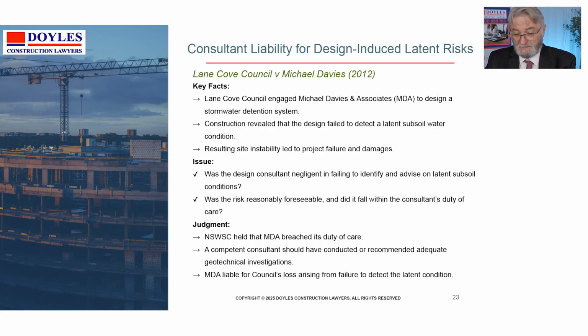You'll have to be careful in these cases where you have a professional designer to get an accurate measure of the damage. In this case, for instance, the damage would not be the cost of responding to the latent condition. It wouldn't be the whole cost of rectifying the site instability. It would be the extra cost caused by the fact that it had to be done in a hurry while a contractor was on site, rather than being done at leisure when more competitive bids and arrangements could be organised to cure that. So it's important, when you have a consultant who has breached the duty of care, to accurately calculate the damages that he can logically be required to bear.